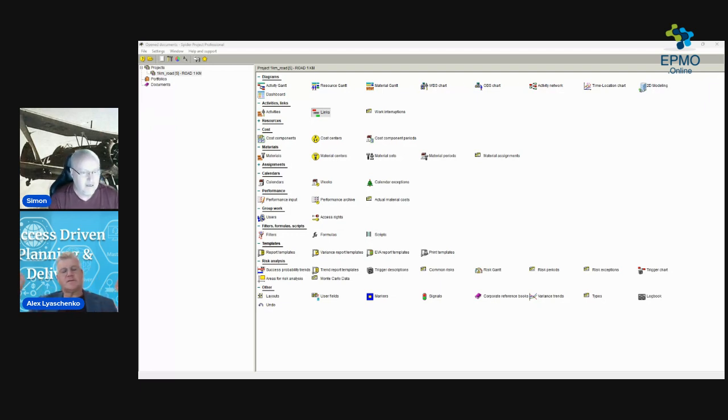Yes, so you're breaking these into standard types. In the example you explained, you have 3 different types of standard road, so you will create 3 templates, not just one. You don't take one template and readjust it for this particular project. Rather, if there is a fragment which is not typical of the others, you do it as a separate fragment. So you put in 1.5 kilometers like that, 200 meters like that, 1 kilometer like that. You're breaking them into reusable fragments. It's always reusable fragments.